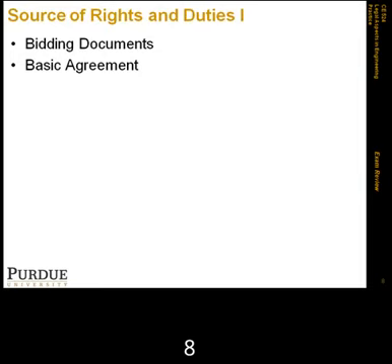It talks about how the work is going to be performed, the time of commencement and completion, the contract sum, the amount of money to be paid, and the provisions for progress payment. It usually incorporates by reference the other documents, and this is where the parties find the dotted line to sign.